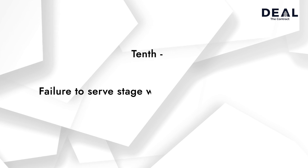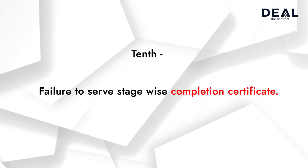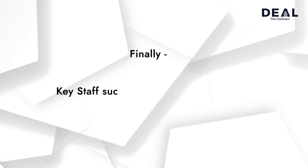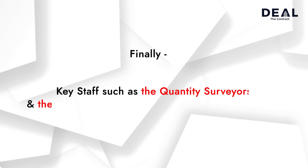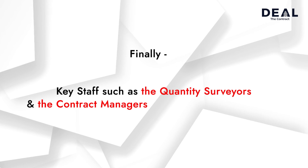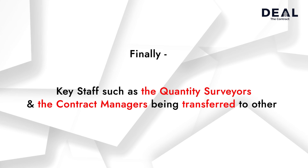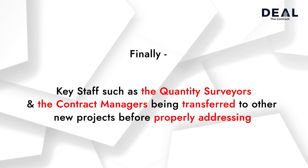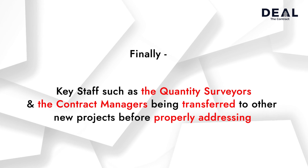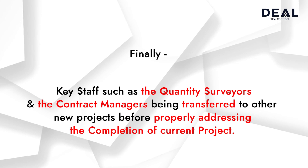10) Failure to serve stage-wise completion certificates. Finally, key staff such as quantity surveyors and contract managers being transferred to other new projects before properly addressing the completion of the current project.